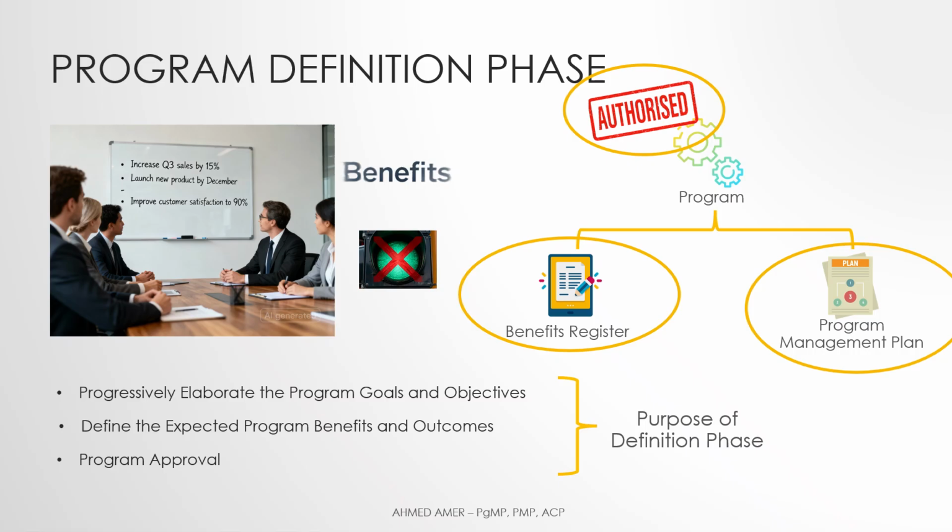Programs are not there by coincidence. There may be a number of steps executed by a portfolio management body prior to the start of the program definition phase. The portfolio management body may develop initial requirements, high-level timelines, scope frameworks, what can be reasonable costing, and concepts such as products, services, and organizational outcomes.